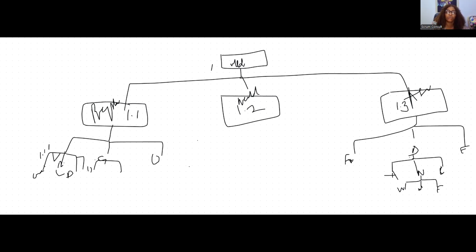So when we come in tomorrow, don't forget I said this is our thesis and this is our deliverables. This level is our deliverables, and you can have work packages at the end of each. Your work breakdown structure is your foundation to every project deliverable. It starts from your scope. You need to know your scope baseline, the things that are covered and the things that are not covered. So at this point, let's say we're talking about food, right?